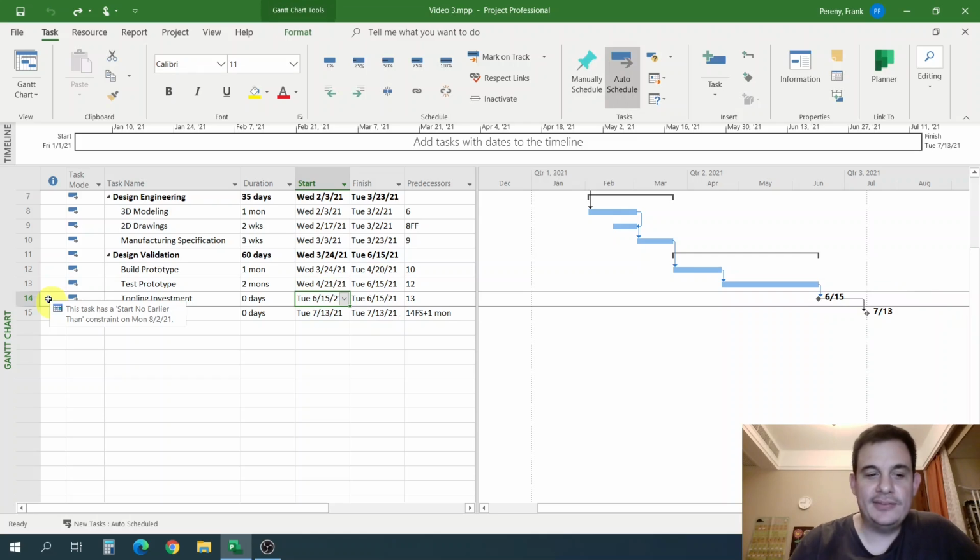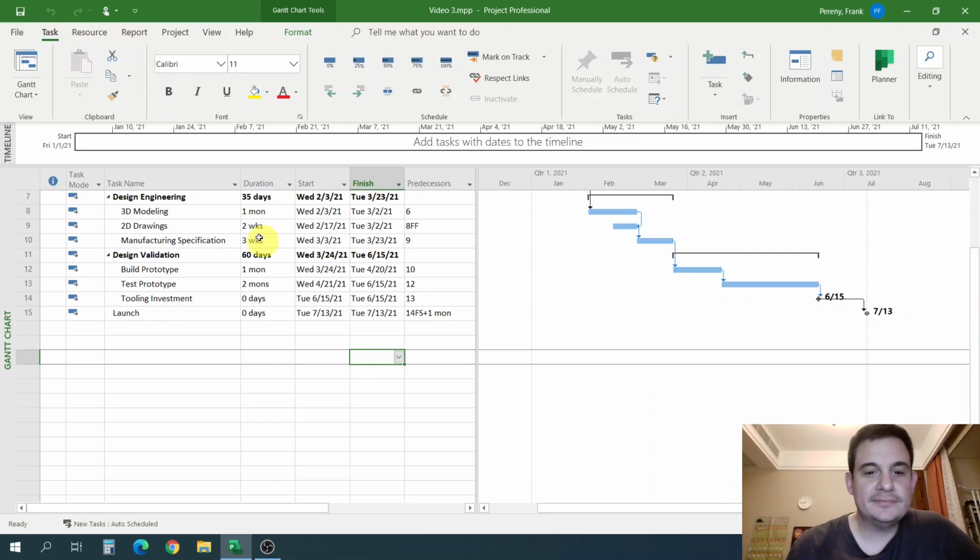So that's why it's really important as you build your schedule to think about what constraints you have on your tasks. Don't just focus on getting the result that you want. Okay, I want this to line up to this month or to this date. Instead of focusing on the results, focus on the relationships and that they make sense, that they're the right relationships. Otherwise, your project plan that works today might not make sense tomorrow. It might be totally broken tomorrow. And you might have to go through and manually start changing everything again, or rebuilding all those relationships to something that makes sense. Okay.